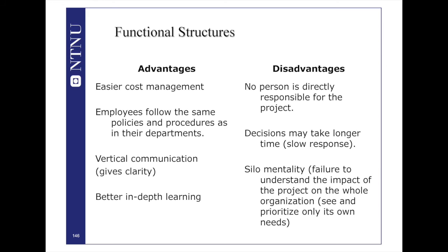And as you can see, projects take longer, because first you communicate vertically, and then you go horizontally, and then you go back vertically. So this cross-functional communication doesn't actually exist. Everything has to do with the top management. So projects take longer. And the focus is not the impact, but always the process itself and adhering to the requirements of that particular department. And for that reason, they sometimes, rather than optimizing the work for the project itself, do the opposite. They optimize the project to fit the context.